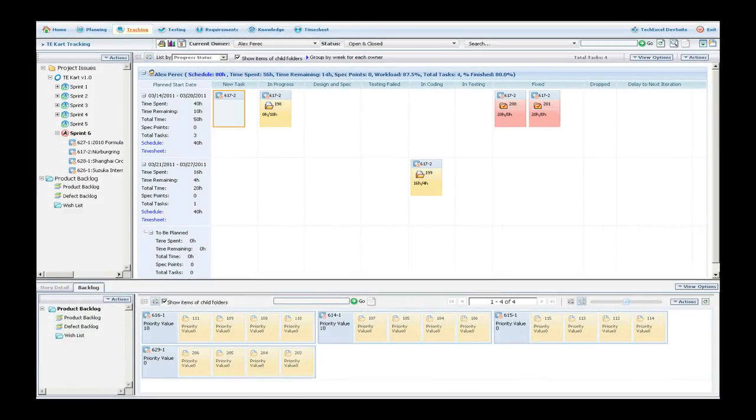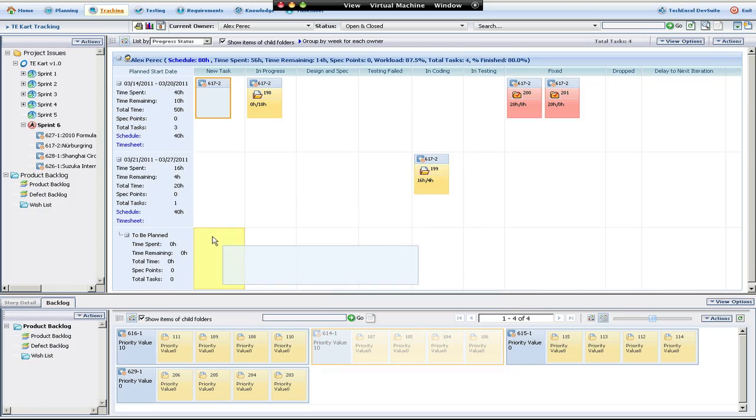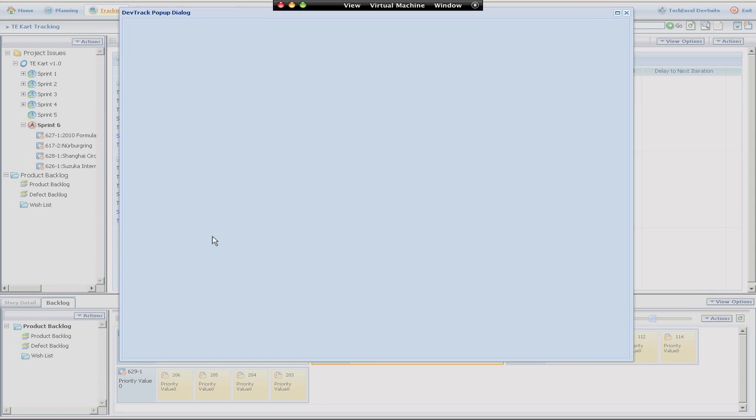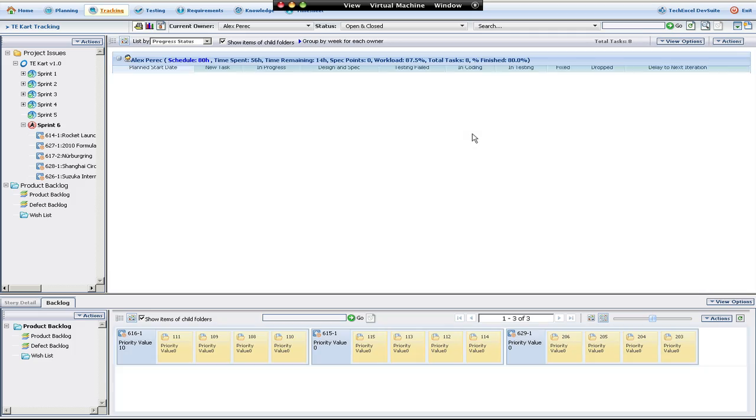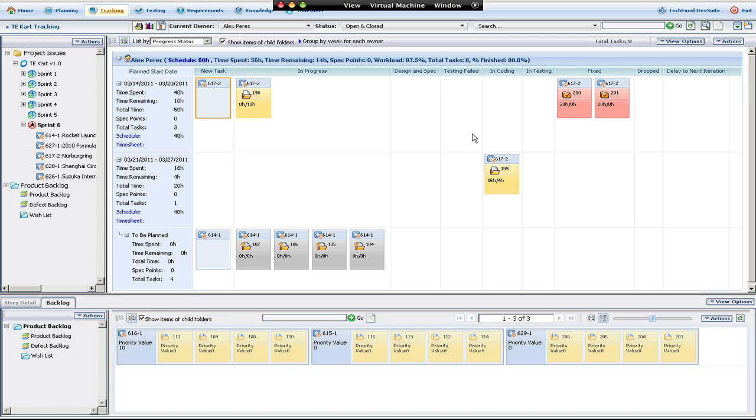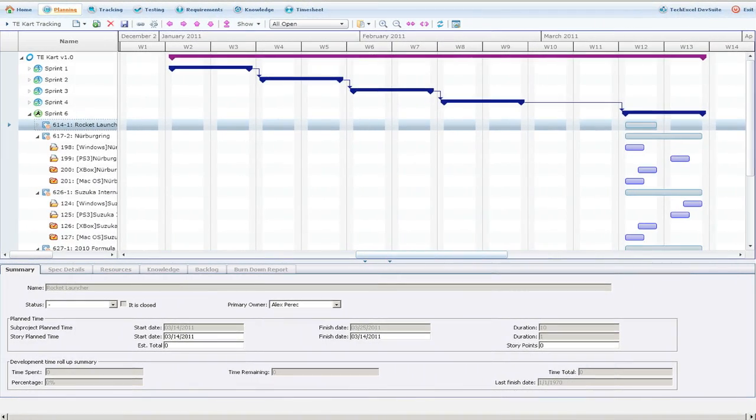Scrum teams are designed to be self-driving. This means that scrum team members select which individual tasks they want to work on based on the priority given by the product owner. This is unlike a traditional project where tasks are assigned. We do this because of the belief that people developing the software or solving the problems know how to do it best.